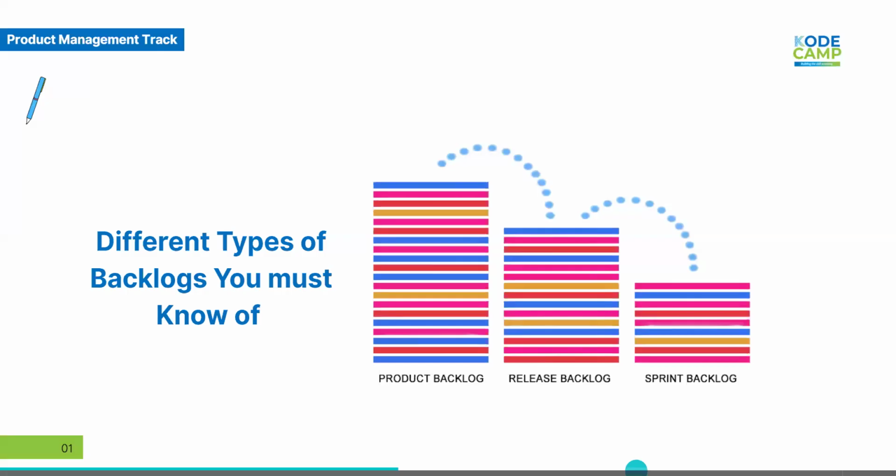now we are in the day-to-day level, no longer in the months and weeks level. The sprint backlog is what your team is actually working on. Let's say this week's sprint is your current execution list, your to-do list, your deliverables. It's pulled directly from the release backlog, or from the product backlog if you're not doing release-based planning. If you're not doing any release-based planning, you can also pull from your product